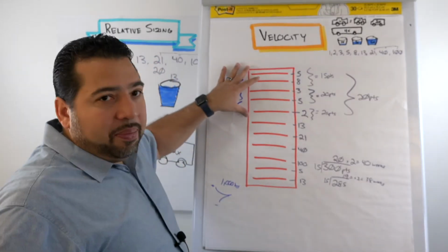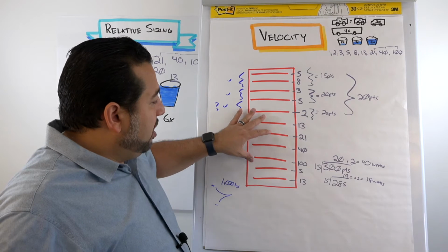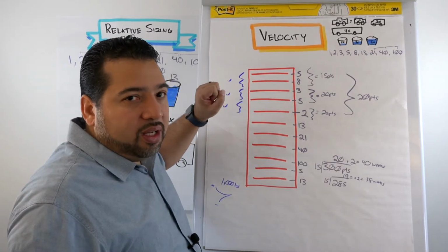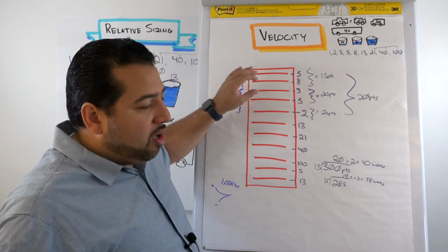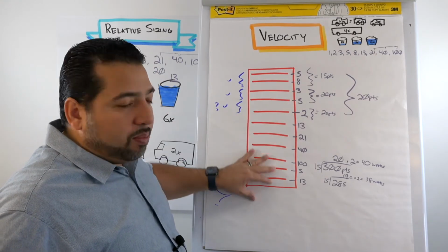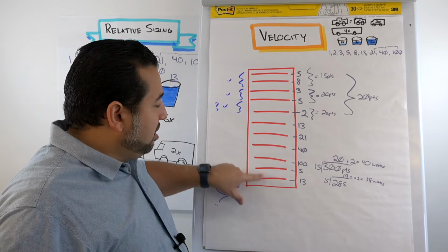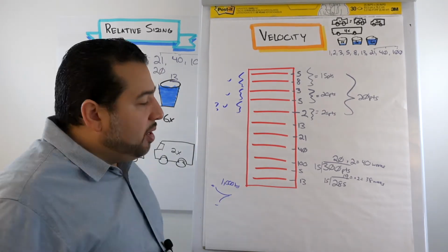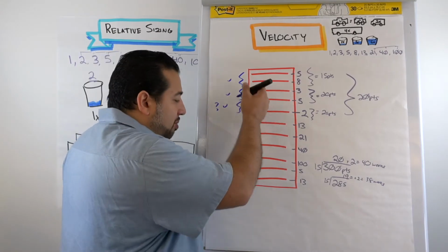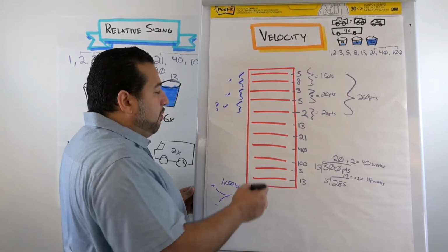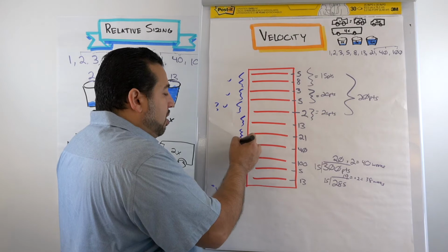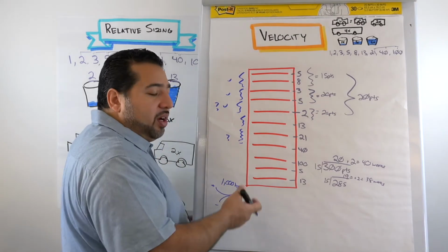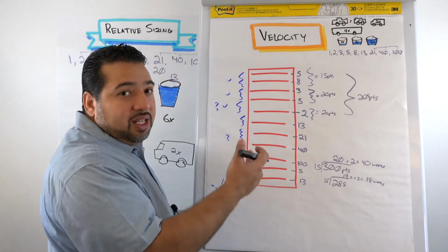Well, the things we did up here are really going to affect the things down here. We're getting better with the product, better with the tooling, and understanding the business more. And so we're going to be able to become a little faster down here. That means the time-based estimates on these items down here are no longer accurate. So to get a prediction, I have to have the team re-estimate everything all over again. And then as we get farther down the backlog, and I want to know how long till we get done, I have to re-estimate everything again, in order to figure out how much time is needed. And that's going to take time.